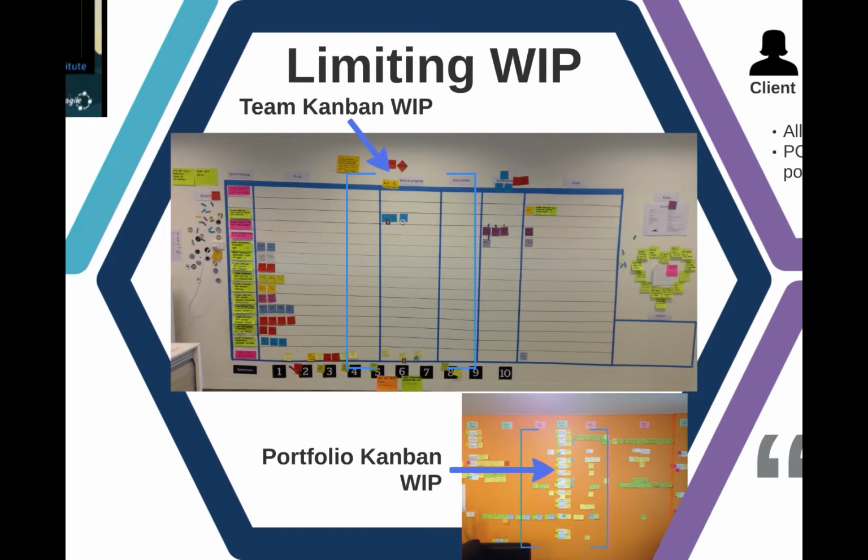So for my team in particular, rather than saying, well, per project we'll have a Kanban, and different people are going to interact with that, because we've got some hidden WIP going on there, obviously, and we've got cognitive overhead with multitasking because you've got to work on 3 projects, and that's not necessarily going to be transparent to everyone. So we chose one Kanban for one team, a team dedicated to the delivery of anything that's in its list.